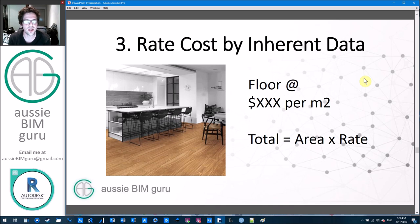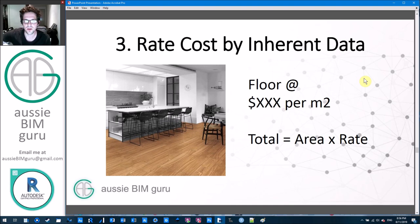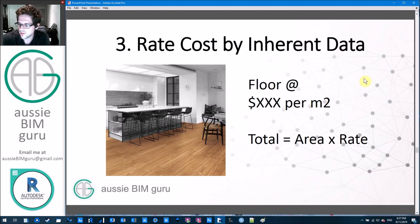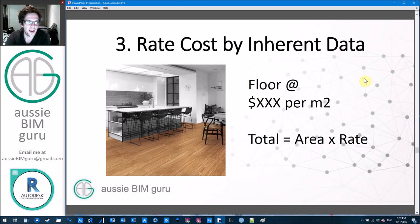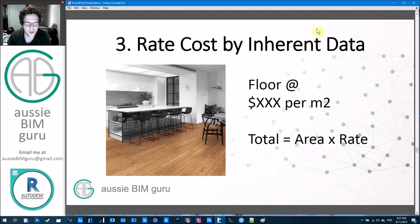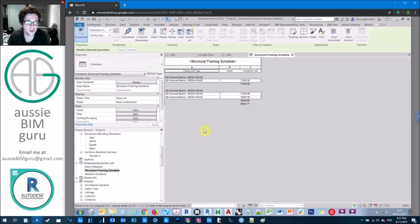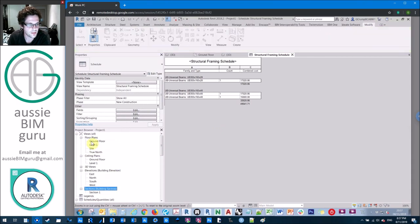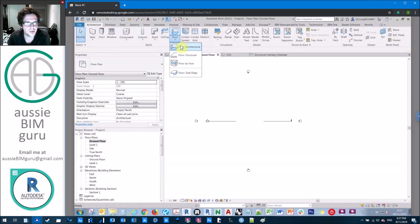Technique three is a little bit easier because some of the work is done for us. This is what I call rate cost driven by inherent data — parameters that come by default under certain categories. For example, floor area: you don't have to calculate it, it's just driven by the size of the floor you draw. All you have to do is associate a cost rate to it and use a calculated field in a schedule. I'll model up a couple of floors.